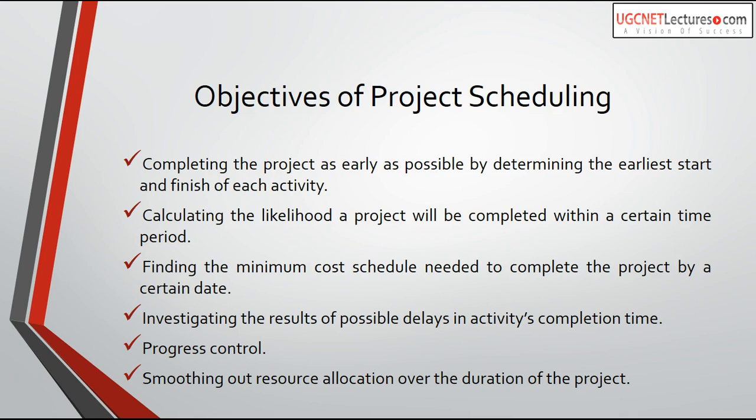The first objective of project scheduling is completing the project as early as possible by determining the earliest start time and finish time of each activity. Some activities depend on each other, meaning we cannot start one activity before completing the previous one. For example, coding cannot be done before designing, and designing cannot be done without requirement analysis. These activities are serial — first we do requirement analysis, then designing, then coding. Each activity is assigned a start time, finish time, and resources like person and time.